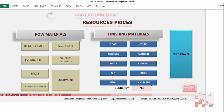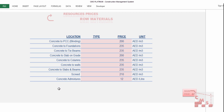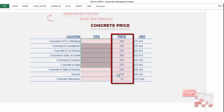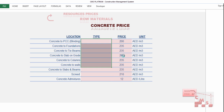For concrete, we find major items: blinding concrete, foundation concrete, tie beam, slab on grade, columns, walls, slabs and beams, screed, and concrete admixtures. You can add concrete types — C15, C20, C30, C40, C60, or whatever is needed. The most important thing is to put the price per cubic meter for each kind of concrete.